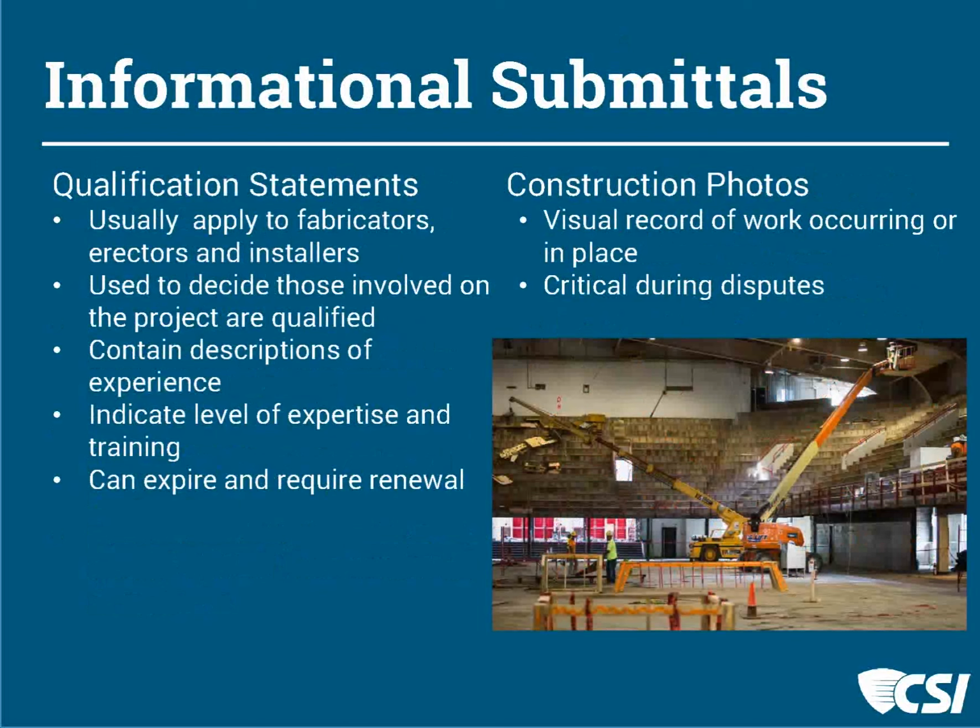It's important to keep an eye on these because they can expire or require some sort of renewal by a particular subcontractor on a project. So you will want to, when you get these, put that calendar reminder. Same thing with performance and payment bonds on a project, or particularly insurance coverage on a project.